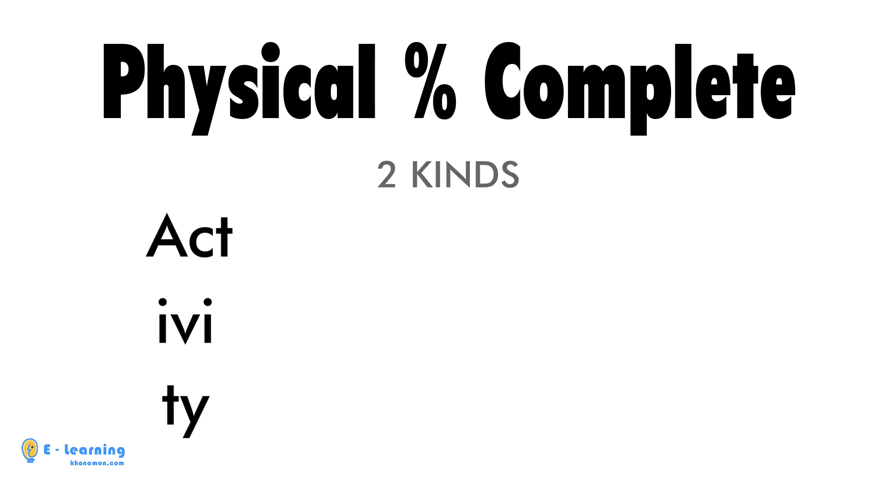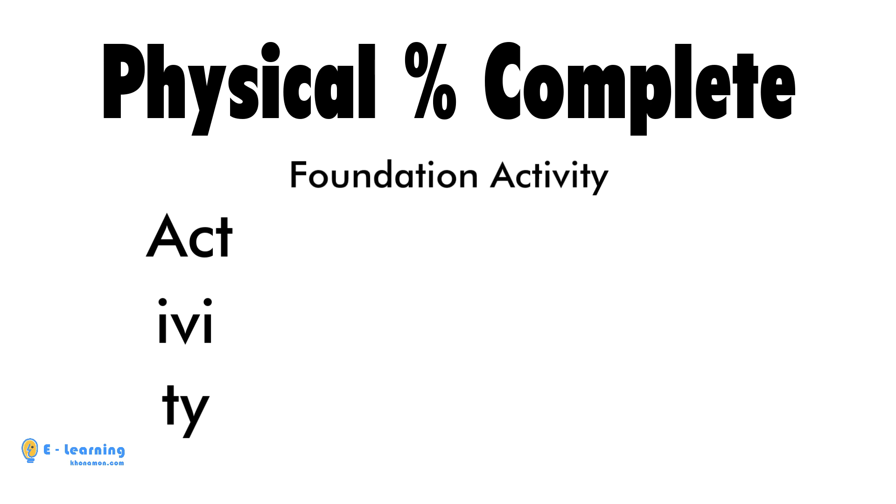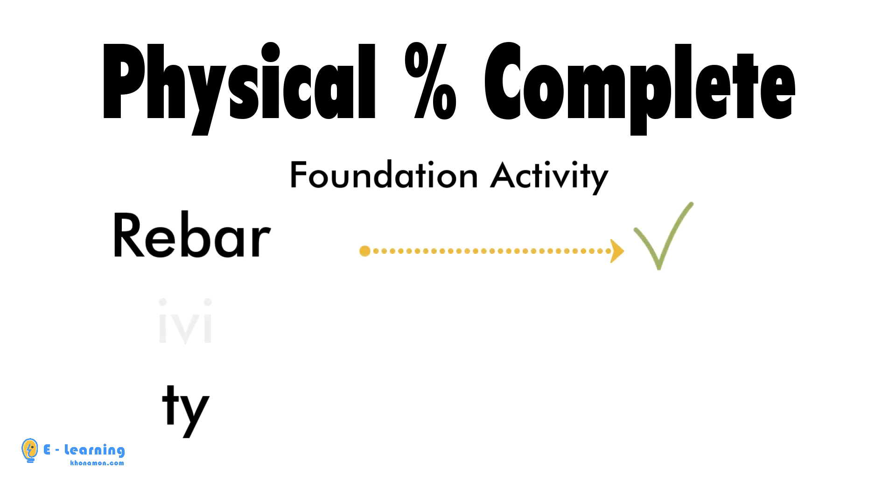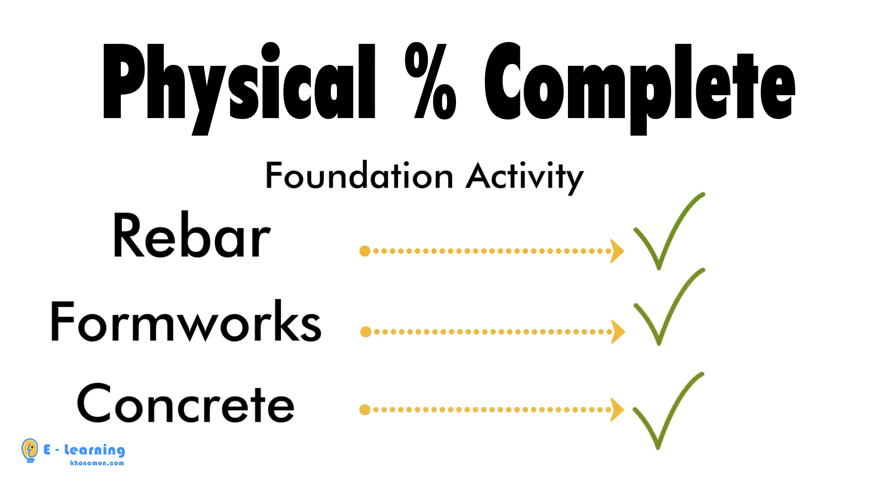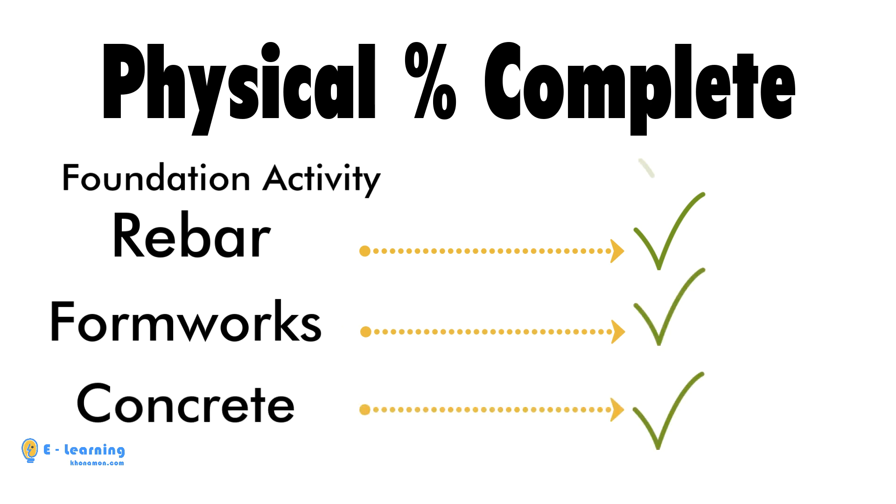For example, we have a foundation activity. This activity contains three steps. For finishing foundation, first we need to finish rebar, then formworks, and finally concrete. At last, the foundation activity will be finished.